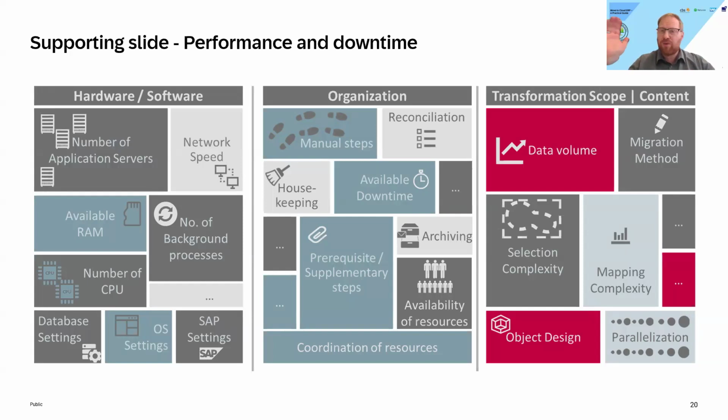So you can imagine that during uptime, in let's say a week period of time or so, you're migrating the whole system. That is off the critical path already, right? And then subsequently, you're doing the Delta capture, the Delta changes, which in the first Delta would only take the changes that accumulated over the course of the uptime migration. So let's say that 1 week.